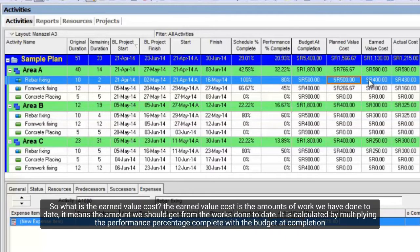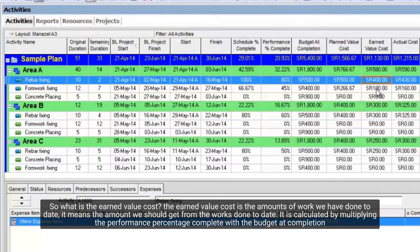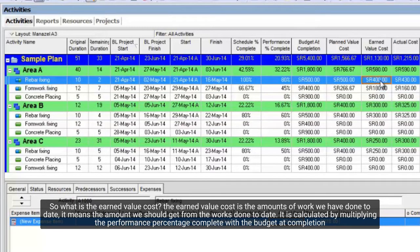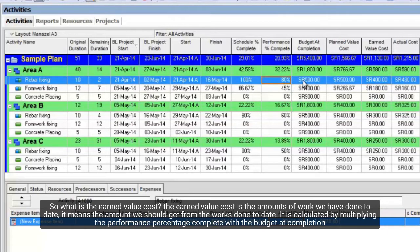So, what is the earned value cost? The earned value cost is the amount of work we have done to date, it means the amount we should get from the works done to date. It is calculated by multiplying the performance percentage complete with the budget at completion.